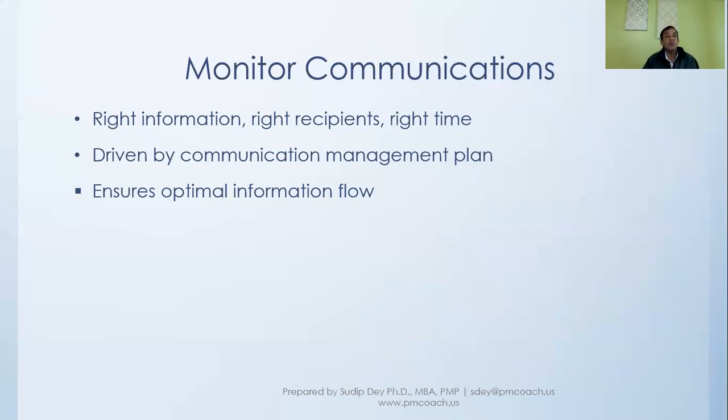Now, what will happen typically, and we said that before as well, is we have a plan made, and we use this plan to manage communication. As we are managing communication, we will be monitoring how we are communicating. We are monitoring its effectiveness. If we find something is not working, we are going to make changes to the plan. When we make changes to the plan, the new plan will take effect the next time around as we are communicating.